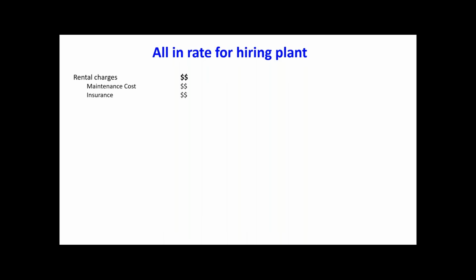Even in other countries, a rented car should be covered by the insurance of the rent-a-car company. Okay. So rental charges, then operational cost. In the operational cost, there will be a fuel cost for you. There will be a driver or operator cost. So these are operational charges. Since under hire the maintenance cost is covered, we don't put the maintenance cost under operational charges.